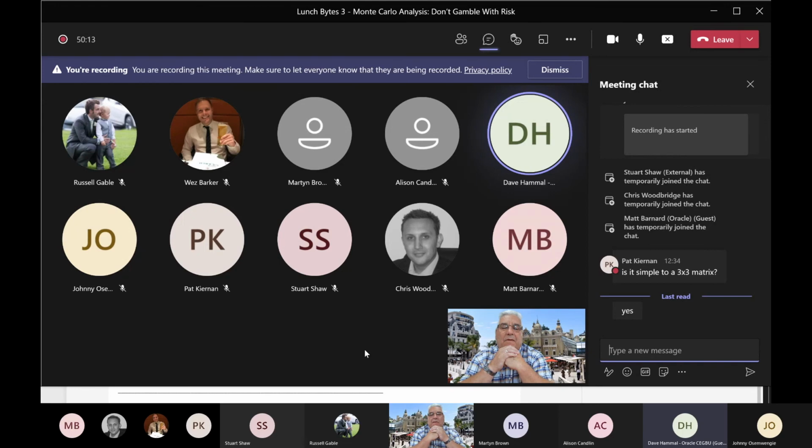And the recommendation is a few hundred activities, because if you start getting more detailed than that, it gets quite complex to manage, and you end up making overgeneralizations around how you approach it. But certainly appreciate that's not always that simple a thing to do, right? It means potentially having two versions of your schedule that you're keeping in sync with one another, right? The detailed one and then a summary schedule.